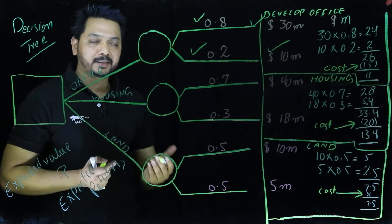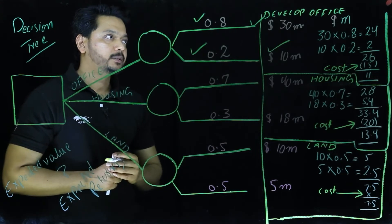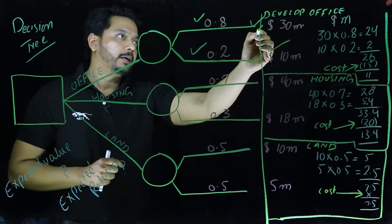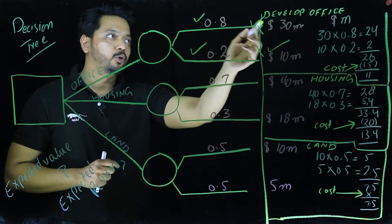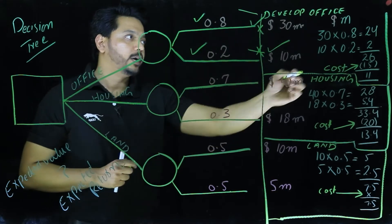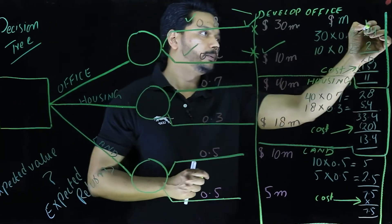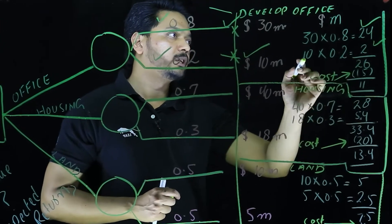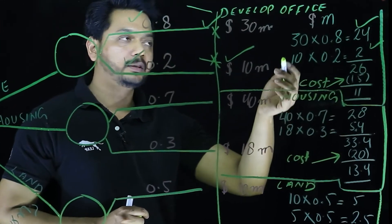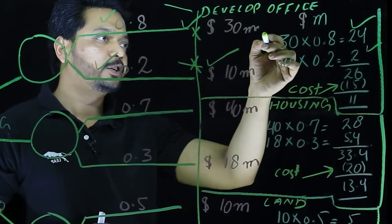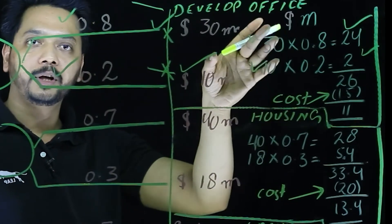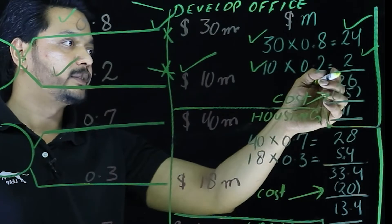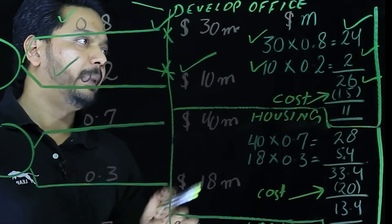The method says that what we need to do is that we can multiply the expected outcome with the probability, both of success and failure. So here I have calculated it. You see, once I have done the calculation here, I have multiplied the expected return with the probability in both cases of success and failure, which has given us $26 million.